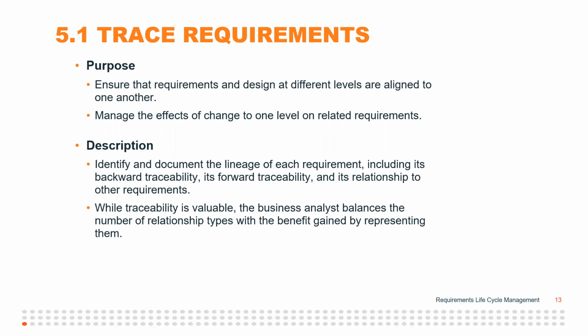And you need to make sure that you actually track each requirement and what it's a part of and what it affects. However, it says here, while traceability is valuable, the business analyst must balance the number of relationship types with the benefit gained by representing them. Do you want to sit there and just trace requirements for a million years and never go forward? Well, no, of course not. So at some point you have to say, I've done it enough, right? I've traced it enough.